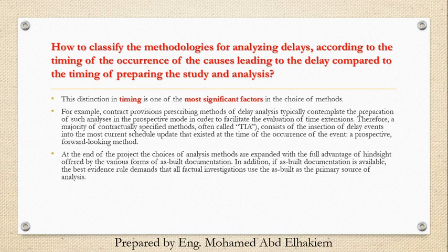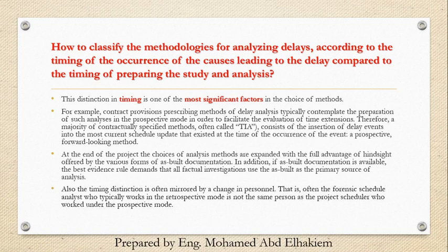In addition, if as-built documentation is available, the best evidence rule demands that all factual investigations use the as-built as the primary source of analysis. Also, the timing distinction is often mirrored by a change in personnel. That is, often the forensic schedule analyst who typically works in the retrospective mode is not the same person as the project scheduler who worked under the prospective mode.